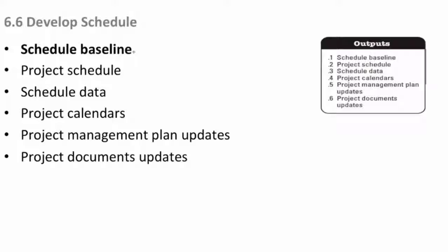The project schedule, which is the living document that we use day to day to take actuals and put them into the schedule. If it took 2 hours to do a task and the task said you only need an hour, okay, well now you've gained an hour in your project schedule. That may or may not change your critical path depending on where that activity is in your network diagram, but it might. And likewise, if it's a 2-hour task but it took you 5 for some reason, as an actual, your project schedule would reflect that, and that may or may not affect your end date.